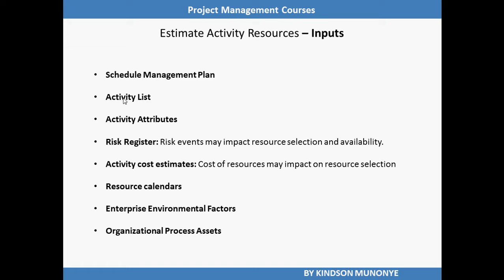Now this is an important one: resource calendars. A resource calendar is a calendar that identifies the working days and shifts on which each specific resource is available. Information on which resources, such as human resource, equipment and material, are potentially available during a planned activity period is used for estimating resource utilization.